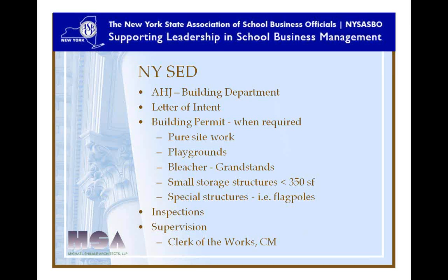When we do energy performance contracts, which we'll talk about a little later, it usually encompasses all the buildings, because they all usually can benefit from an energy management system, sort of like what I was chatting about with those two sister elementary schools, where one was using twice the fuel each year. And lighting improvements and computer load management improvements typically can apply to every building. But in some of our EPC projects, we've actually had to remove buildings from the project because the cost of some of those EEB or BCS items outweighed the benefits to the project.